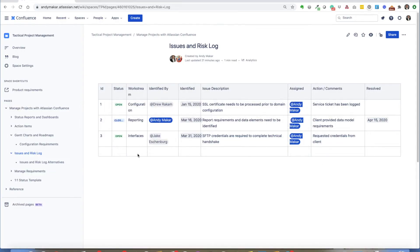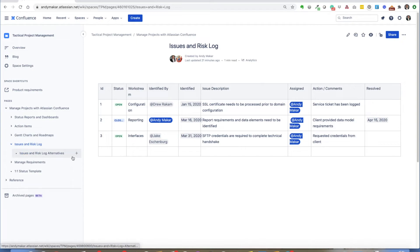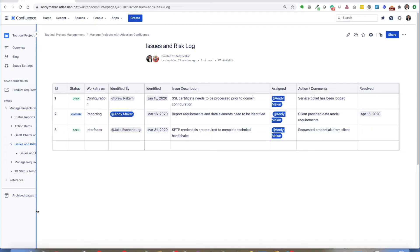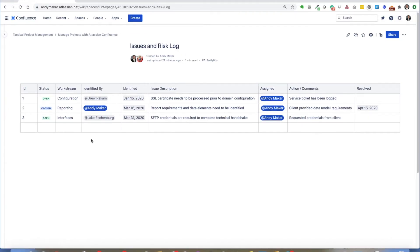In this example, I'm going to show you how you can use an issue and risk log with Atlassian Confluence. I've drawn a very simple table that allows you to keep track of open and closed issues. I've built the table with a common status, workstream, identified by, identified date, issue description, and so on — a typical issue log that you might build in Excel. But the power with this is it's a collaboration platform, so it doesn't have to be just myself going in to update the issues. Any team member can go in and update the appropriate issues.